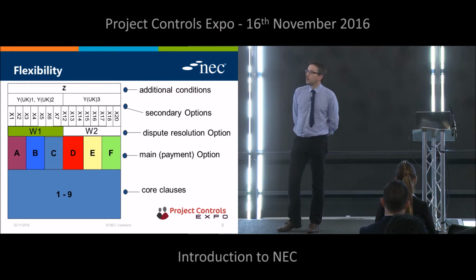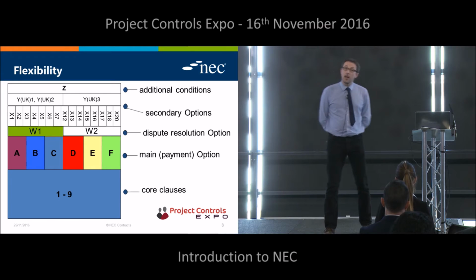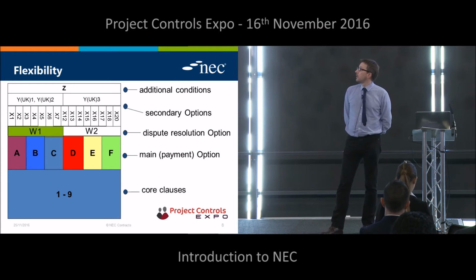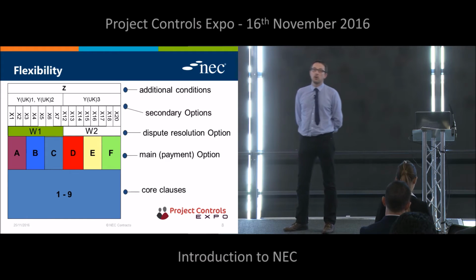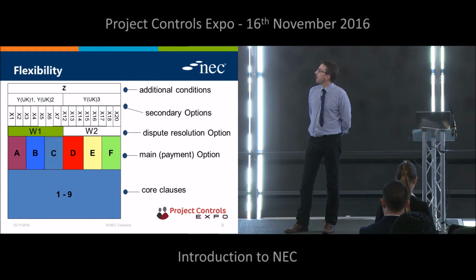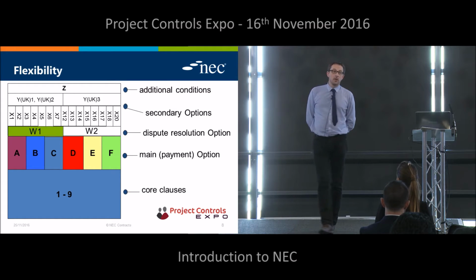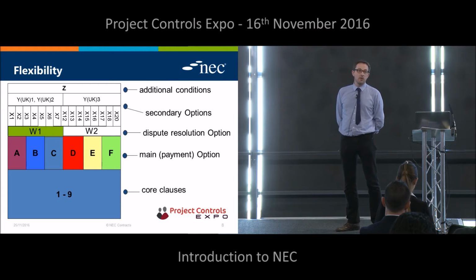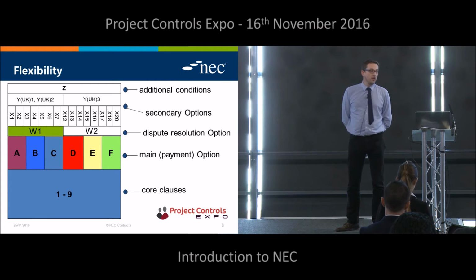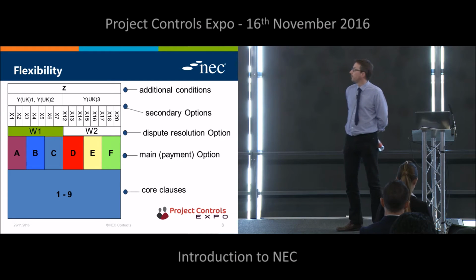For example, retention or delay damages, changes in law and so on and so forth. There's a whole variety of things that you can deal with through the secondary option clauses. If there are any very project-specific issues that need to be dealt with, then the additional conditions, the Z clauses, are available to write in any specific contract requirements that may suit whatever it is you're procuring. Okay.